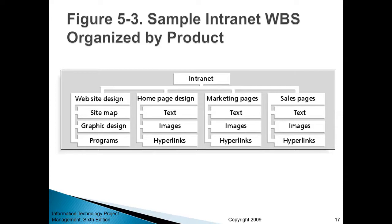There are a couple of ways to do this decomposition. One way is product-oriented decomposition. For example, if the final deliverable is an intranet — an internal website for organizational communication — that product can be broken down into sub-products like design, homepage design, marketing pages design, and sales pages design. Within each sub-product you have specific steps: writing text, creating and uploading images, and fixing hyperlinks.